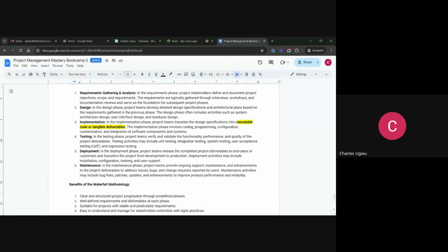All these things are done within the developer environment. After testing all these things within the developer environment and everything is working, then it's time to call an external party, who is not even part of the project team, to come and test. The person is like the person who is going to use that software for everyday use. The person will come and test it the way they need to use it to do their work. And after testing it and it's working, then it means that it's ready for deployment. That is user acceptance testing.